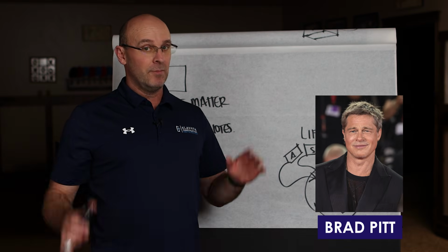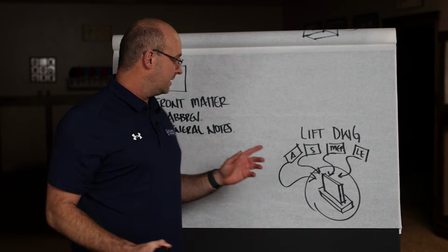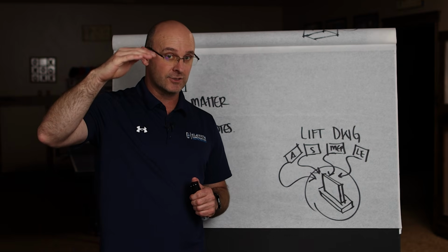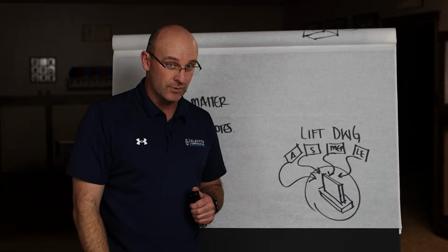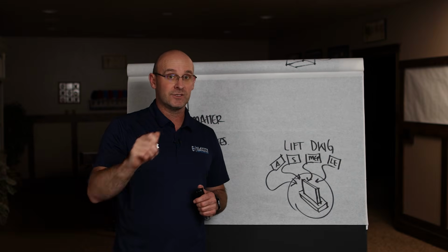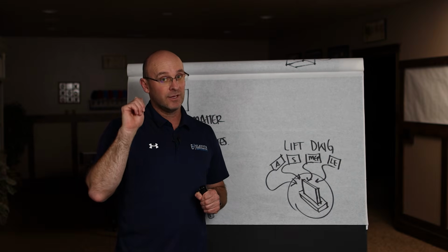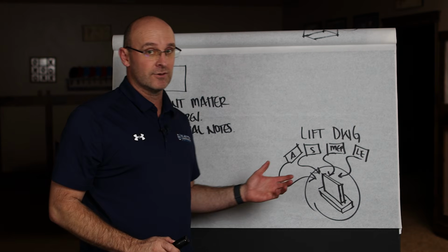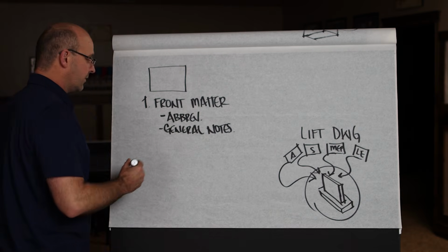I just want you to know, massive project in the Northeast, didn't read this, didn't know that as they were going up the building, they had to be a certain amount of levels down in their basement and the excavation and their placement rhythm, and they blew their schedule by 6 months, and it was a massive problem. And that was in the general notes. You've got to read them. So pull out things that are applicable.